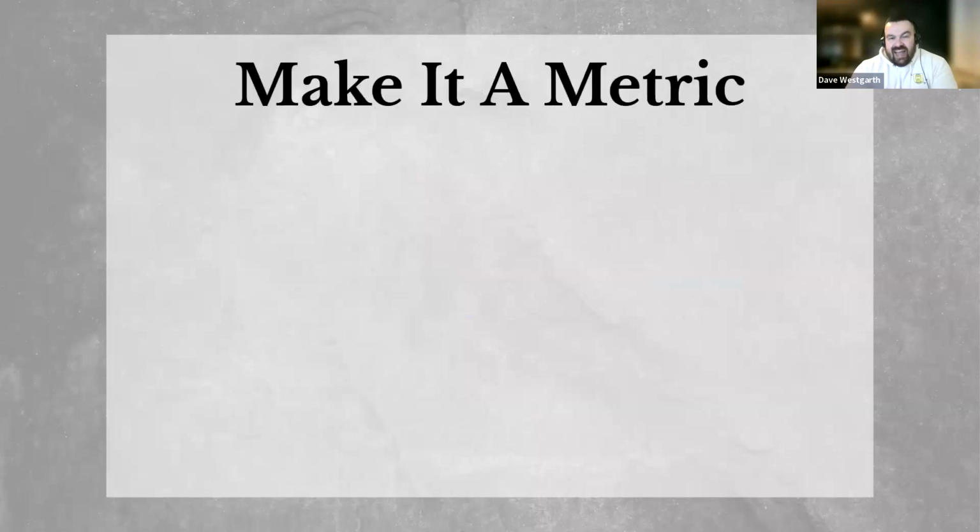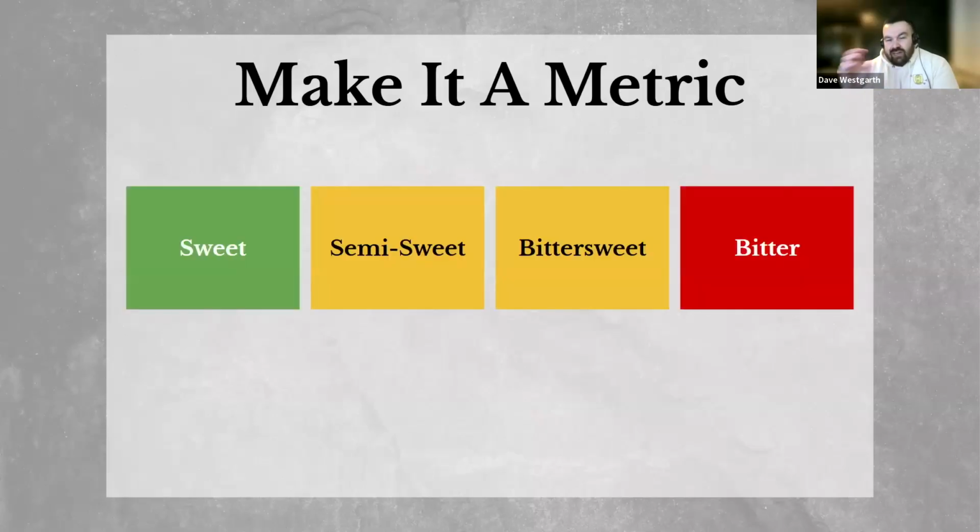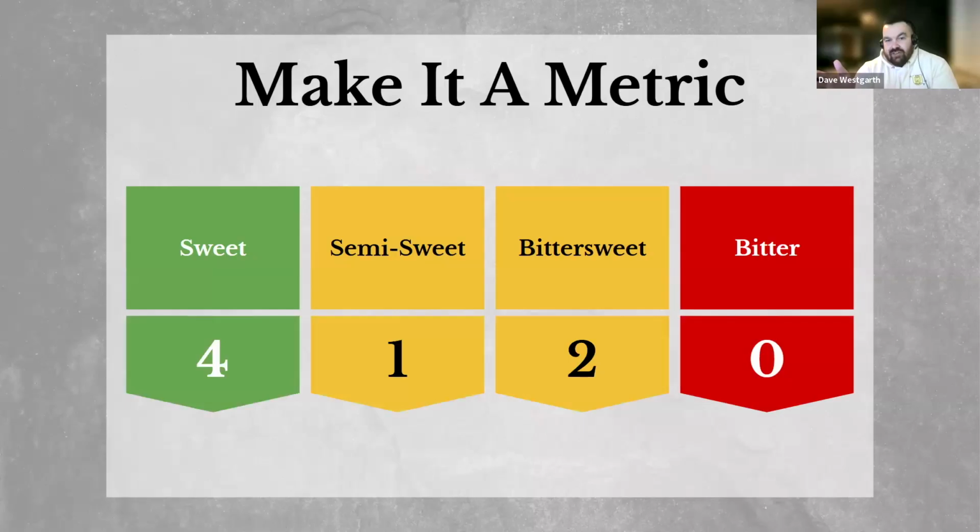And the final idea on the framework at large is that it's really handy to make this a bit of a metric for you, even if it's just an internal, notepad-style metric of how your team's performing. We can take each of these endings and, over the course of half a dozen sprints, say, categorize each of our sprints depending on where we land, and we'll get something that looks like this.